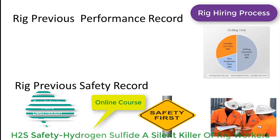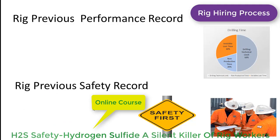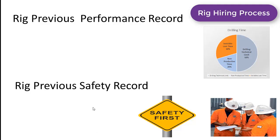The operator will also look at the rig's previous performance. They may ask about the contractor's previous track record — what maximum depth they drilled the well, how they completed the well within the time, and what problems they experienced. They will also review the rig's previous safety record, including how many accidents and injuries occurred, and evaluate different safety standard parameters to assess whether the rig crew works in a safe manner.